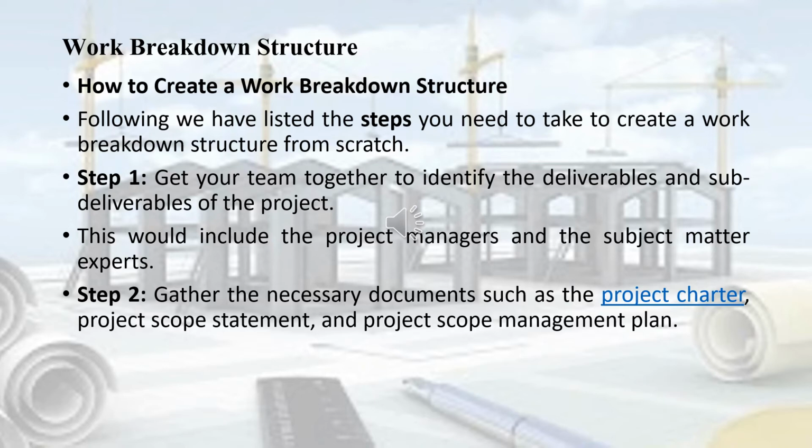So this is a very important piece of document. The project scope statement is going to tell you more specifically what extent of work is to be executed. For example, just to emphasize on project scope statement, are you going to be constructing a building only on a shell and core basis? Or are you going to construct the building as a turnkey project? That is, you're going to do everything and just hand over the project to the client with everything inside the building, the infrastructure required for the building to work, the finishes, and so on.